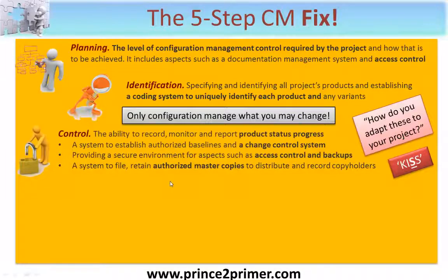Control: the ability to record, monitor and report product status progress. And in setting up an appropriate control environment, you need a system to establish authorized baselines. A baseline is something which management or an appropriate level of authority has agreed is the latest version, and a change control system for managing change in a controlled manner.